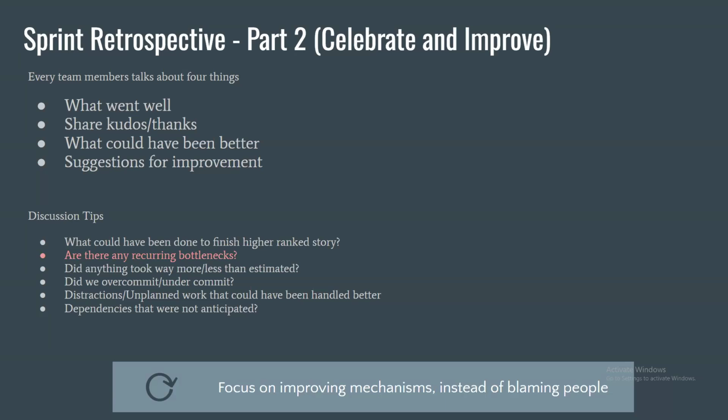Okay, in the interest of time, the non-completed stories, yes, non-completed stories go back to the backlog, and the feedback from the stakeholders goes to the backlog. For example, if they said yes, this reminder that you have implemented is very good, but they want certain changes to be done, those go back to the backlog, and then they are prioritized. So non-completed stories typically will be prioritized higher, because you don't want to leave unfinished work, because that is just